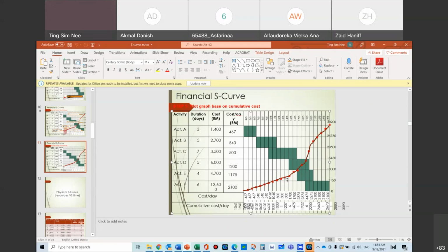So that is another way of managing our cash flow. So let me repeat that again, okay? What you need to do is you take the PV from the client. This is not the amount of money that they will pay you every month. This is the kind of spending that is projected, but obviously they don't pay you every month, okay? So with that projection, you also draw another line based on your own PV of your expenses, based on your budget of expenses on the activity.